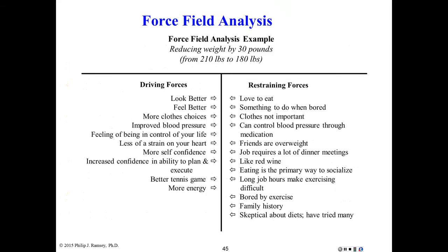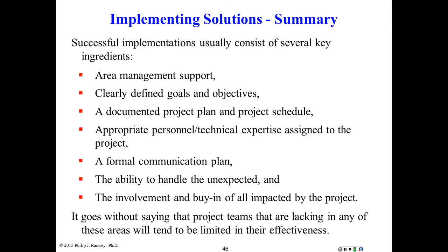And by the way, some tools that can be used, one of them I'll mention called a force field analysis. I'll give you an example. This is typically used by teams to figure out where the driving forces are to improve the process and implement, and what are the barriers, and you've got to address the barriers or you have no chance of success. So this is just a tool to help you in planning the implementation, and it may also lead you to people you need to get on board and communicate with in order for success.